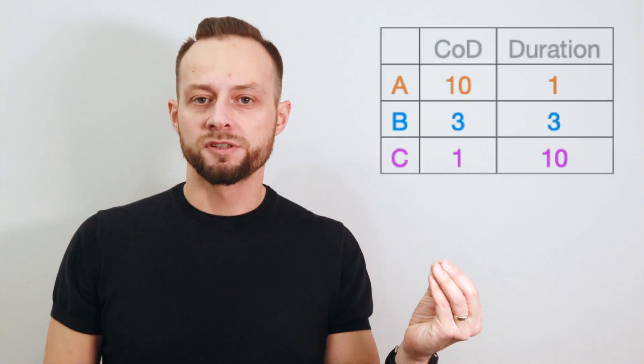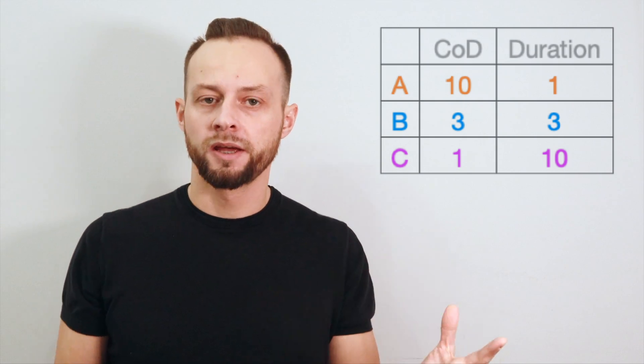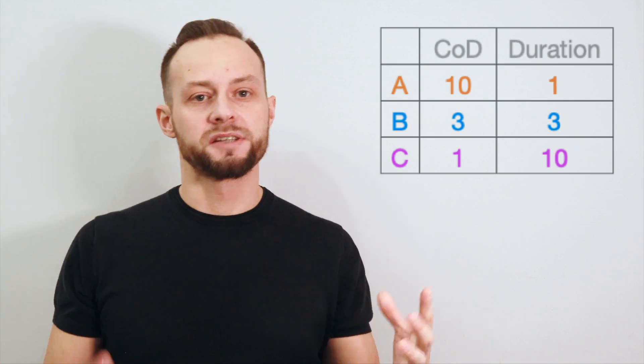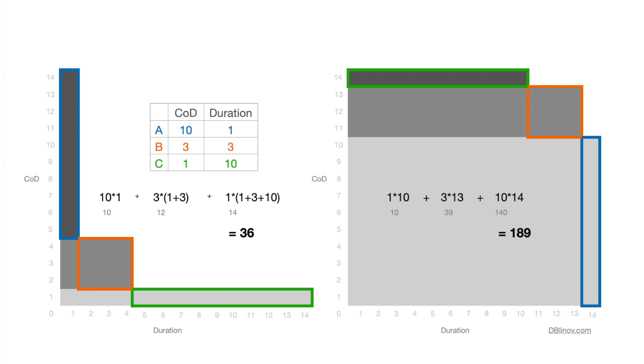Let's take three different jobs: A costs 10 points and lasts one period; B costs three points and lasts three periods; C costs one point and lasts ten periods. Considering two opposite sequences — ABC and CBA — the areas shaded in gray show the CoD in each case. The first sequence results in 36 points of cost, and the second costs as much as 189. So doing the weighted shortest job first delivers the best economic benefits.